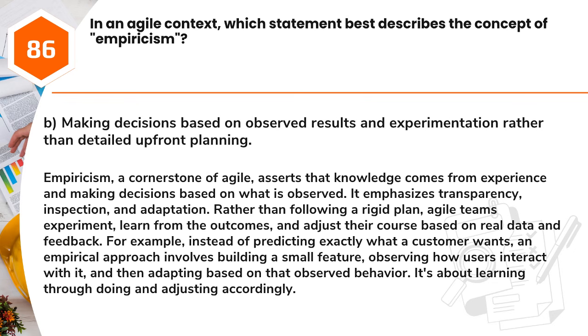data and feedback. For example, instead of predicting exactly what a customer wants, an empirical approach involves building a small feature, observing how users interact with it, and then adapting based on that observed behavior. It's about learning through doing and adjusting accordingly.